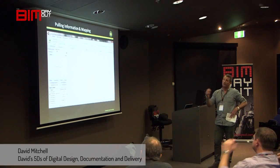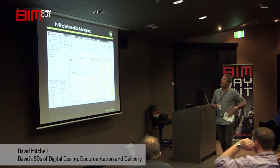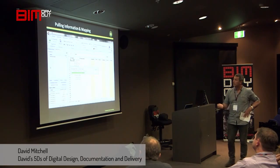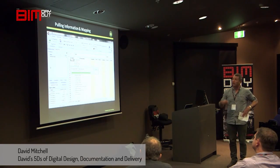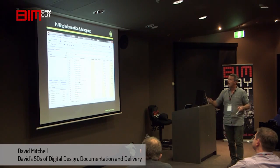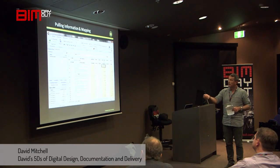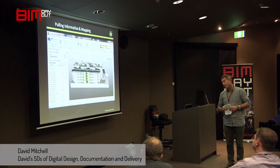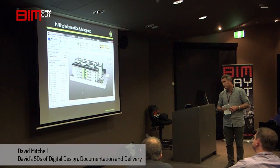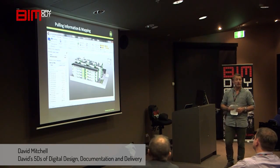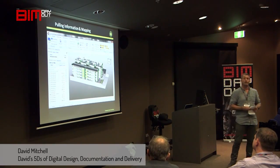In terms of time, this is double speed. The next phase is we're bringing in our estimate template which refers to another database — our rate book — and again this is mapped through. You'll see that the precast panels go precisely to where they need to go in that estimate. So we've generated an estimate of $8 million in around about — if this was real-time — when this was done it used to take about three minutes, and today it takes about 45 seconds.